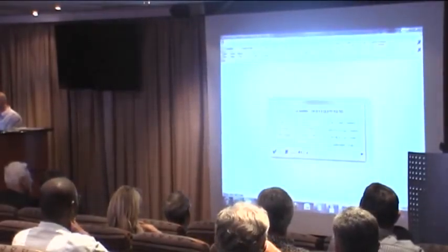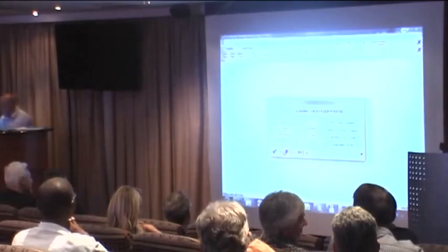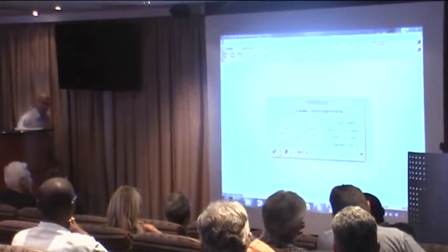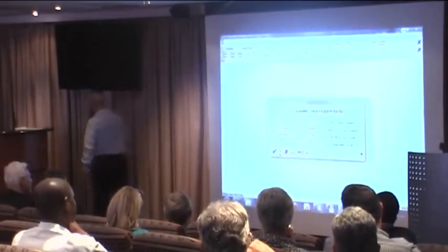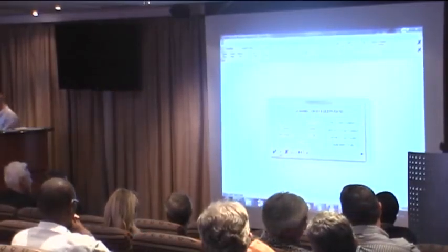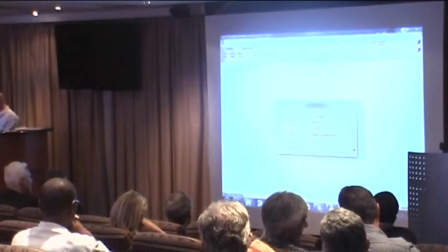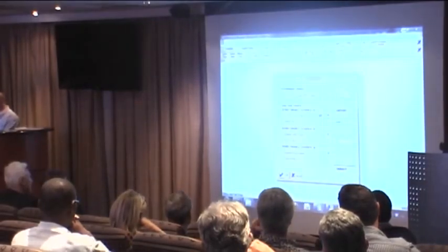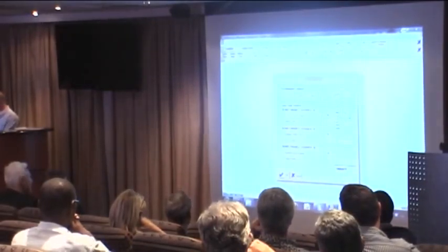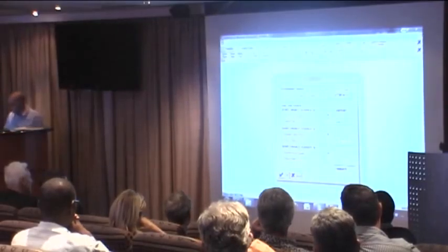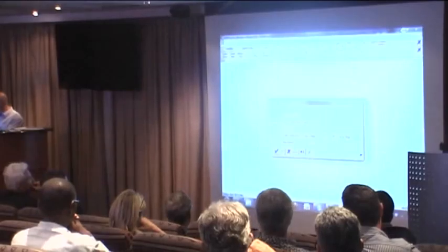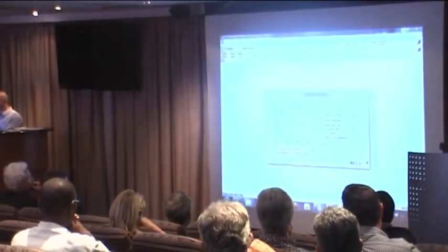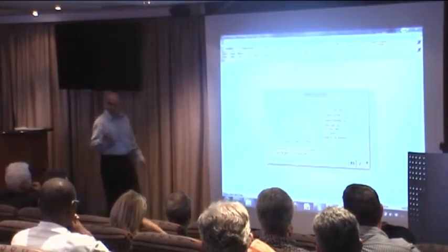Agents Commission. It's going to go through the whole funding side of the project. How do you want to fund the project? How much equity? What portion borrowings? Is it loan account? What is the cost of equity? What is the opportunity cost? What is the cost of borrowings? It will say I want prime plus 0.5%. The system automatically goes and checks, updates it, calculates your cost of funding, looks at terminal values, all your tax allowances, wear and tear, pre-production tax interest.